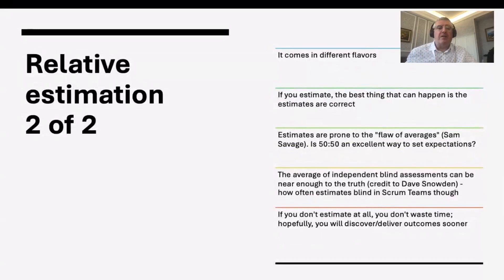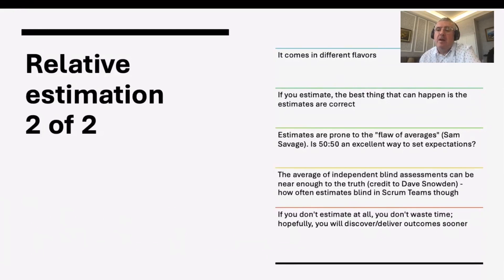Relative estimation comes in a variety of flavors. If you estimate, the best thing that can happen is they're correct. They're prone to the flaw of averages — did you know that 50% of people perform below average? The average of independent blind assessments, as maintained by Dave Snowden, can actually be quite good. But I often find we don't have blind estimates in Scrum teams. And 99.9% of the time, estimates are wrong. They make us feel better, but are there better ways?